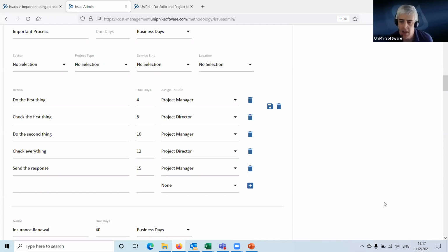We have examples of deployments of Unify on large infrastructure projects that are being used for infrastructure verification. So documents and site visits and various other information being fed into Unify. Each one of those coming in triggers a review process. The person logging it selects the appropriate review process that applies to the documents that have been transmitted in. That's an action list here, and then they know from the point they've received it, they are tracking this, and they contractually have to respond by a certain date, and they can then consolidate this and report on it.